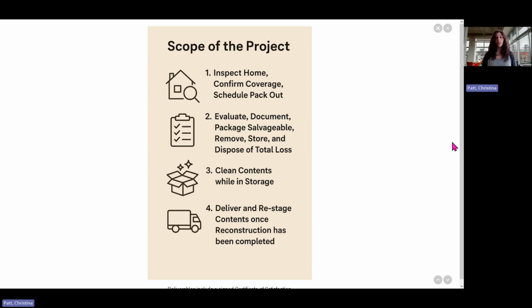During this storage time, we will clean the contents. This can be hard good cleaning or upholstery cleaning. We'll deal with restoration of furniture, or we will also assist the insured with filling out the age and value of their total loss to assist in that reimbursement process. All of these little things need to be completed before reconstruction has completed and the home is ready for delivery.